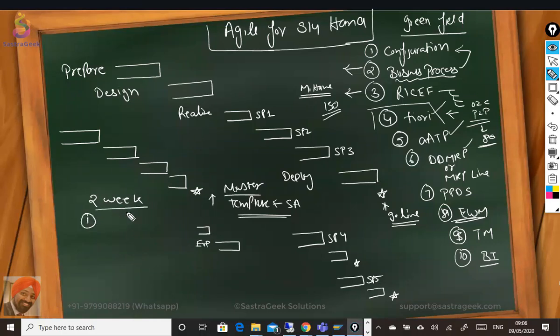One week was explaining the master template and checking what gaps there are. The second week was working with their Indonesia business team to identify the scenarios where there is no gap, or no significant gap that would stop us from testing. That we identified in the second week.